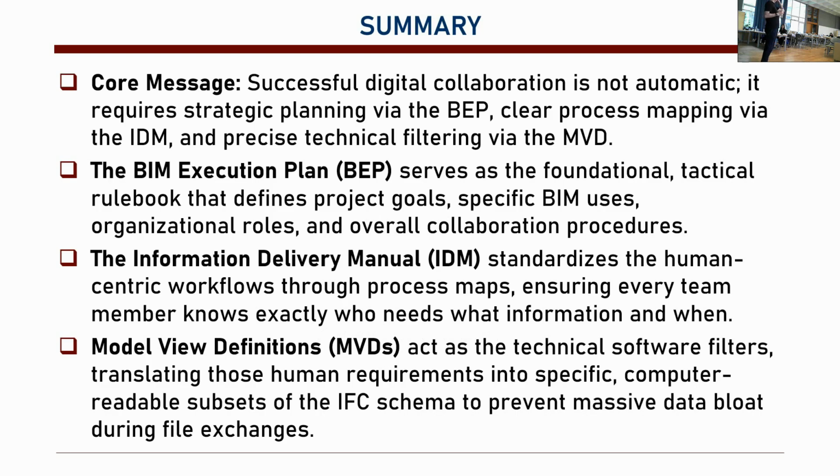Accordingly, if the client thinks that this construction company is capable of doing that, then they will sign a contract with them. They will give them the job, okay? And when they take the job, they start the BEP again with the company. So this preliminary stuff is only their proposed take on BEP. And then at the end, the whole project will have its own BEP.